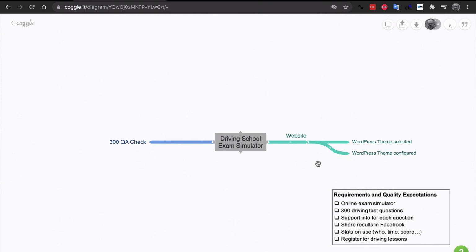Now, what's the next thing that I will do? Probably, because we don't have a website already, or we do have a very simple website, but we need a proper hosting contract. So we need to find a hosting company and have a hosting contract. We will do that with the people themselves. So let's say I will go under here, hosting contract signed. We want to make sure it's a good hosting contract, so I'll just put that down there for the moment. I try to keep an order in everything that I do.